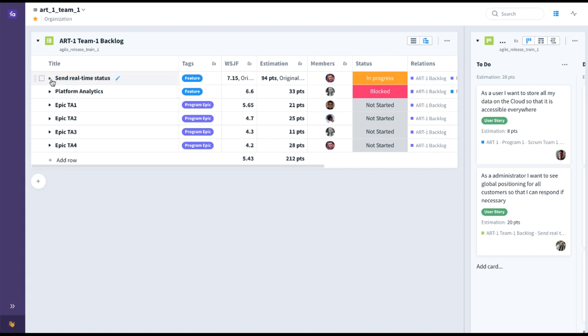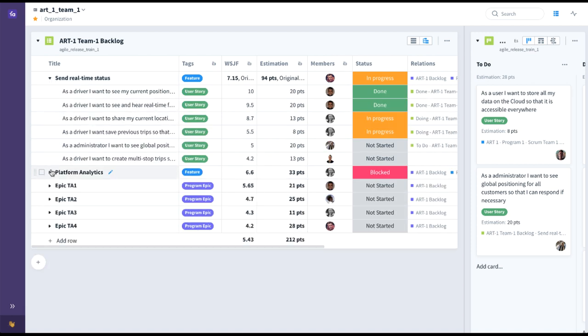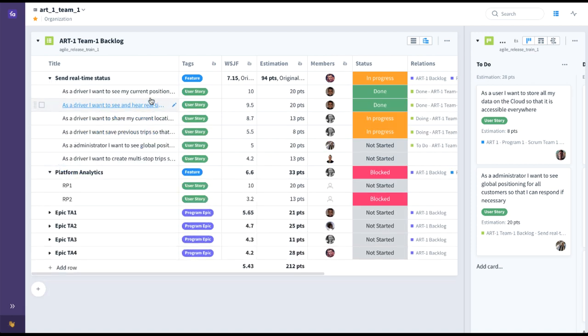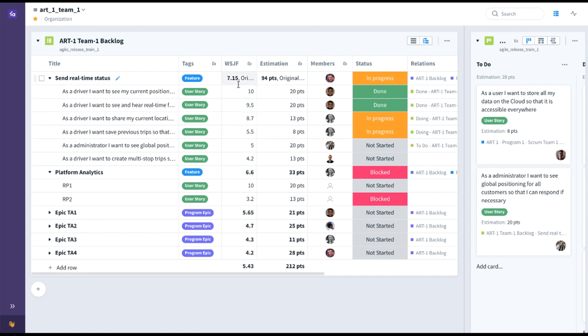Now if we expand each one of these features, you can see that the team has broken them down into user stories. Thanks to the hierarchical nature of Favro's backlogs, you can see how things like Weighted Shortest Job First roll up to an average WSJF, and Estimation and Points roll up to a total sum for the feature itself, which can also be seen at the Agile Release Train level, also known as the Program Level.